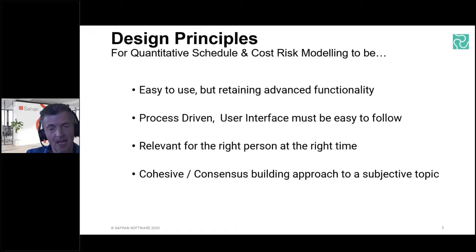So you could take 10 years, 20 years, 30 years of historical weather data and bring that into Safran Risk. Clearly, if you're talking about 10 years of real information, that's something that's really easy for the team to get buy-in to. Right? It's difficult to argue with facts, and in this case, that's what that was providing.